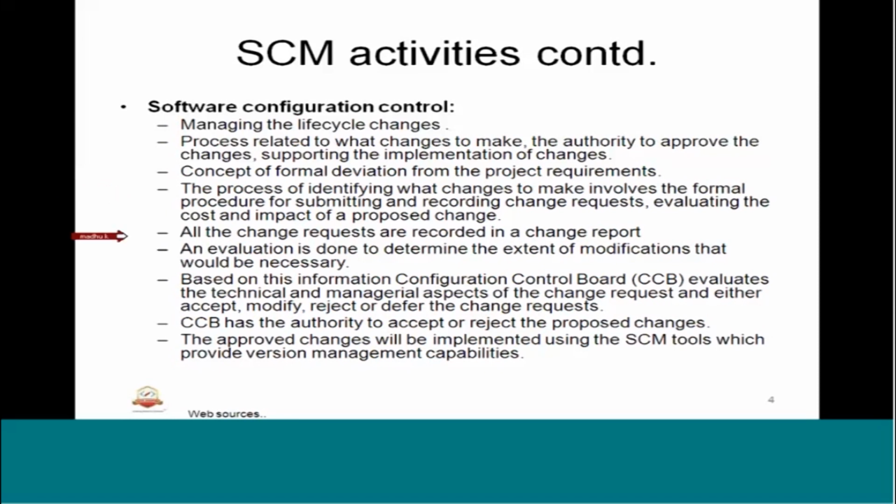All the change requests are recorded in a change report. There is a change report that will identify what changes have been done. So what is the request against which the changes have been done, and what is the conclusion, who is the author, who is responsible, how it is controlled. All this will be part of the change report. An evaluation is done to determine the extent of modifications that would be necessary. So basically the change request will be evaluated to determine what is the modification or the change that is going to happen.